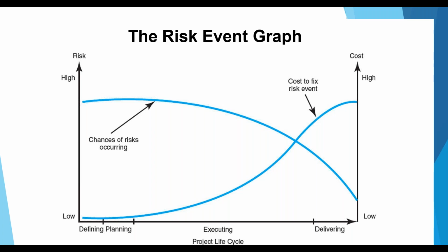And if we refer to the second curve, the cost impact of a risk event in the project is less if the event occurs earlier rather than later. It means in the early stages of the project period, there is an opportunity for minimizing the impact of potential risk. On the contrary, as the project passes the halfway implementation mark, the cost of a risk event occurring increases rapidly. For example, a design flaw occurring after a prototype has been made has a greater cost or time impact than if the event occurred in the startup phases of the project.